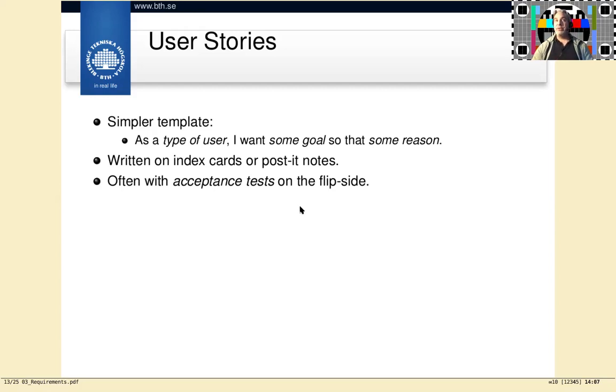With an agile development methodology, everything that's in the backlog that we haven't implemented yet is free to change and add and reprioritize as you see fit, but then we'll take the top of that, the most important things, and for the coming 3 weeks, that's what we're building. If you have something that you'd like to change within those 3 weeks, well, no, but we'll happily change for the coming 3 weeks. So you re-emphasize the importance of the development activities that you do when you work with an agile requirements engineering process.